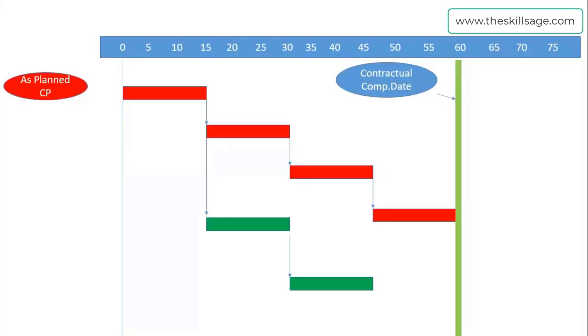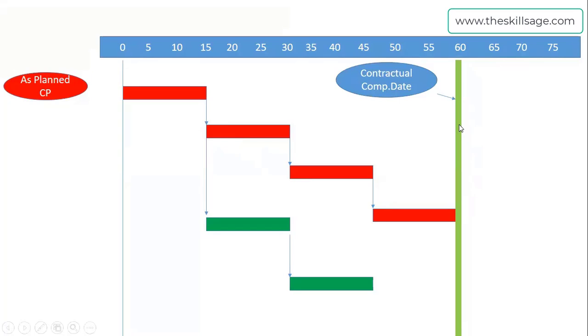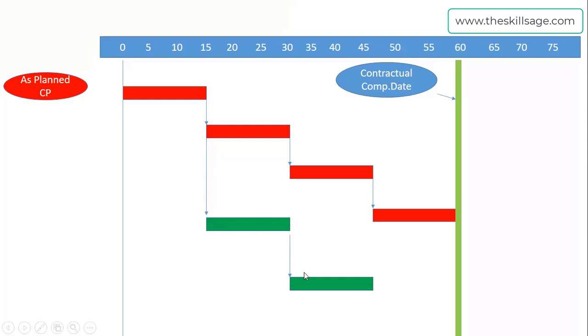Here you can see there is a mini project with two parts: one in red color and the other in green color. The red color shows the critical path of our project, locking it to complete in 60 days, whereas the green path shows our non-critical path. There is no flexibility in the critical path—it is jam-packed within our project start date and completion date. So there is no float. On the other hand, the green path has a gap with flexibility. This timeline represents the float—we can delay this activity path by this flexible timeline.